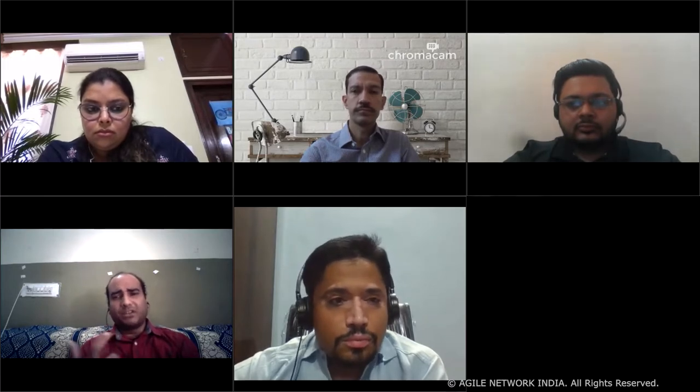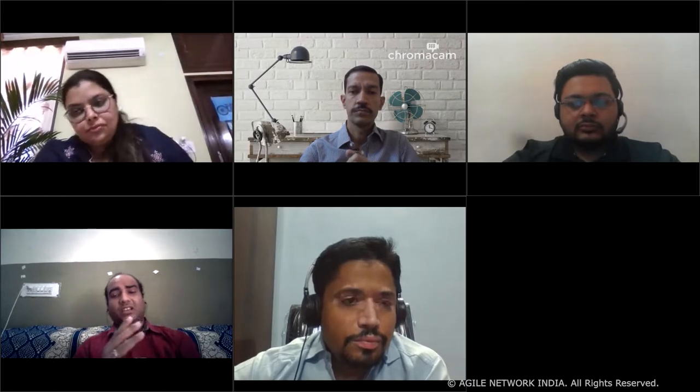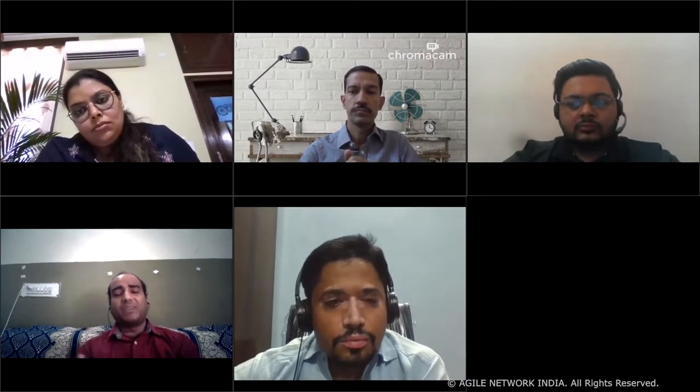Now talking about the primary reasons for scope creep. We can understand from the examples of Megha and Praveen. If I give bullet points, they are: lack of clarity and depth in the original specification document, and allowing direct unmanaged contact between client and team participants. That also becomes a cause. And obviously sometimes the customer tries to get extra work on the cheap, so that is also one of the reasons. Then there is scope creep that you cause yourself because of lack of foresight and planning. As a BA, we are also responsible sometimes. So poorly defined initial requirements is the main cause of scope creep.